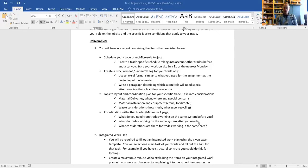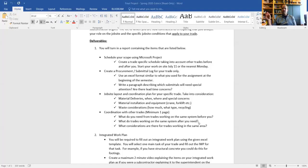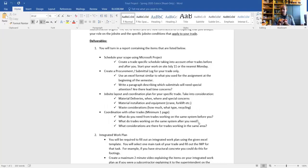Start your work on the site July 11th, which is a Monday. Create a procurement submittal log for your trade only. Go into the specifications, find out what submittals are required for your specific trade, and do a submittal log for those. The dates that the material needs to be delivered come from your schedule. Then write a paragraph describing which submittals will need special attention and whether there are lead time concerns. You'll have a schedule in Microsoft Project, a procurement schedule in Excel, and a paragraph explaining critical submittals and long lead items.